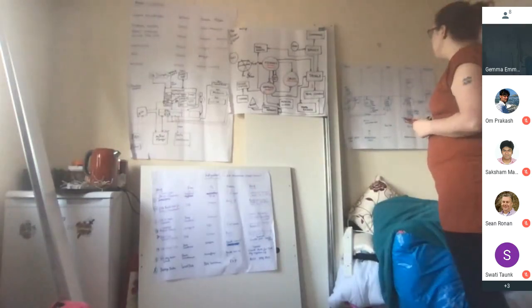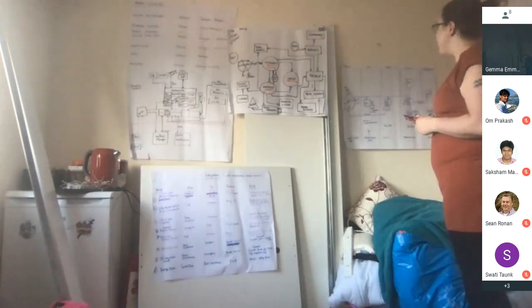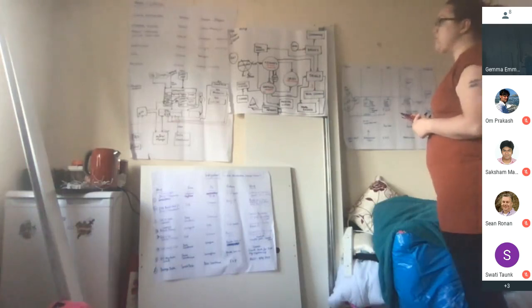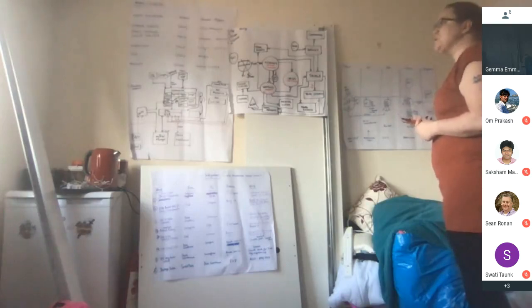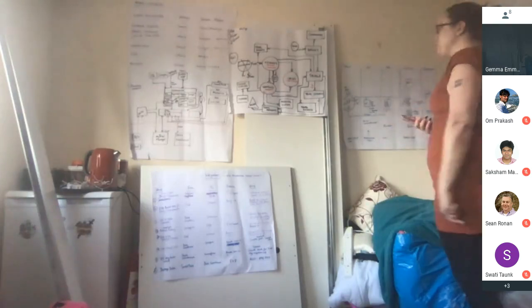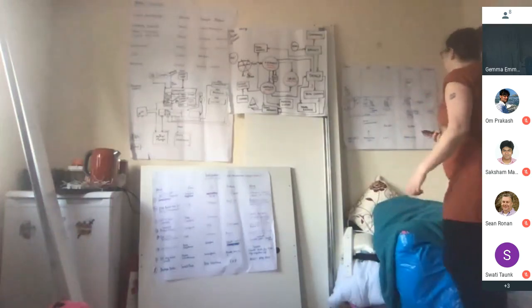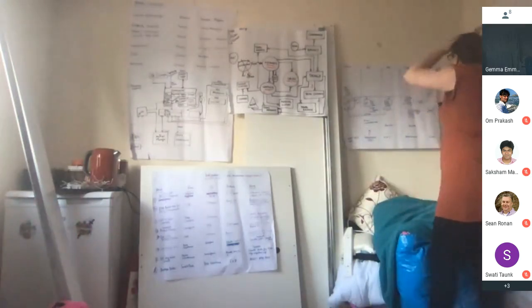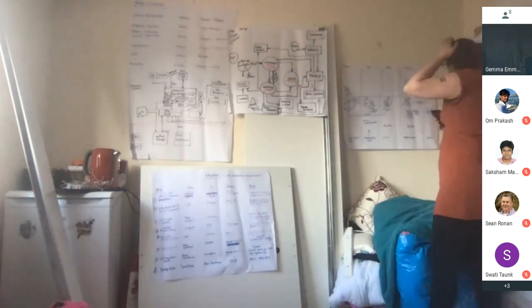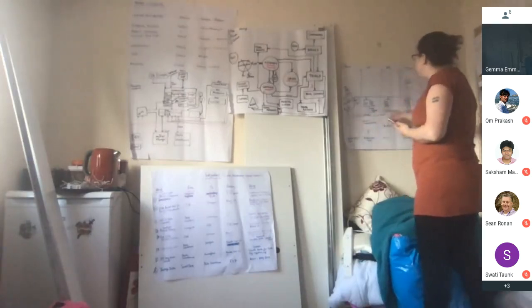be prioritized. As a backup and a fail-safe, I would actually recommend creating some additional UAT automated tests in Provar to support and replicate what the business users would be doing should we run into any bottlenecks later on with users not completing their testing on time. That's my backup plan. If there's any changes coming out of UAT, those will be logged against the tickets in Jira.